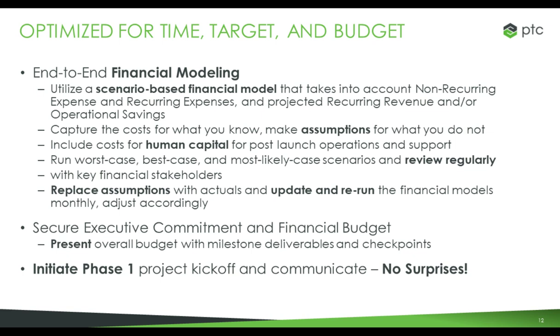My favorite is financial modeling. If you don't do this internally in your companies, I highly recommend you do. If your finance people know how to do this, they know how to think this way, you don't need a major accounting background to do this, but it's going to take all pieces to work together. Build out a financial model that doesn't just work for taking a product to market. Have it work all the way from concept into prototyping, into development, all the way through essentially launch and support beyond that. Put that together, run scenarios against it.